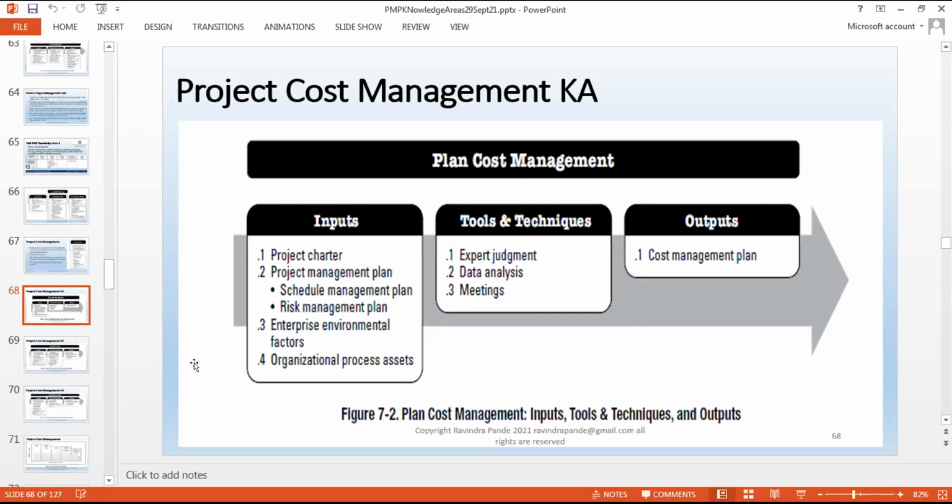In a company like Patni, Cognizant, Wipro, TCS, Infosys, we have a body called the PMO, Project Management Office, which represents the top management for a given project. They normally do at least a monthly audit for each and every execution, so that they'll be sure whether it's a strategic project where we can invest more than the spending, or a profitable project at hand, and we are not eating up our profit, we are not eating up our management reserve, and so on and so forth. So this is the basic analysis we do in a typical project cost management audit.